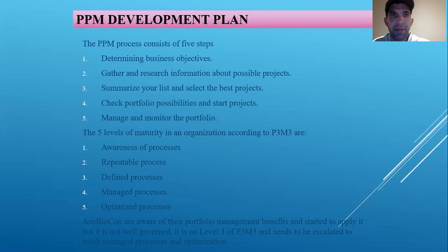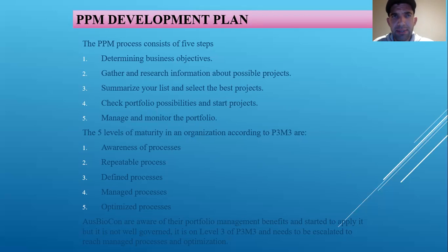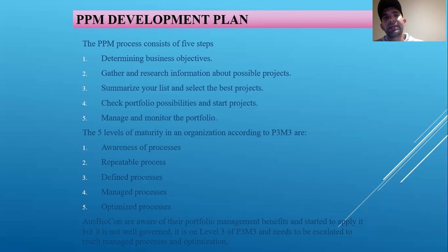Step one: determine the business objectives — outline business objectives through strategic maps and communicate with teams for priority. Step two: research — gather information about possible projects, stakeholders, team members, clients, and managers by collecting data from similar projects and compiling ideas and data. Step three: summarize your list and select projects — use the gathered information to select projects that best work with your business objectives; this data is used to define project variations and create a temporary portfolio.